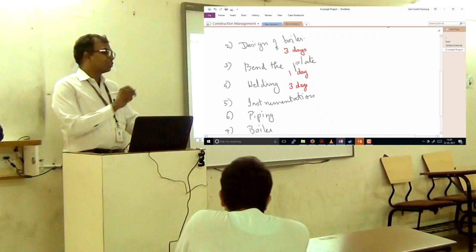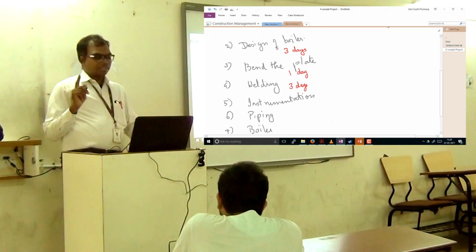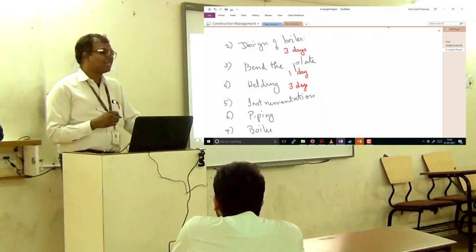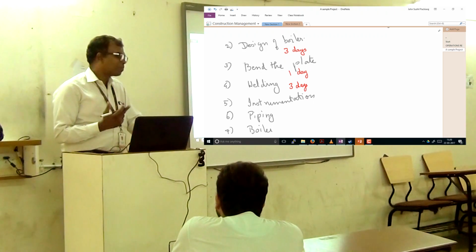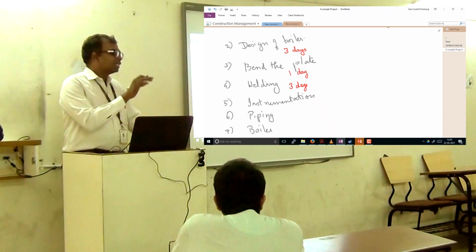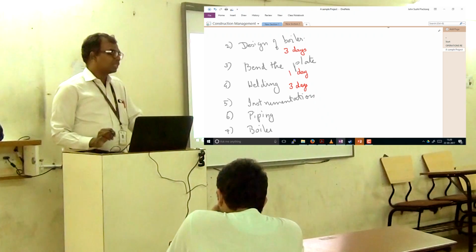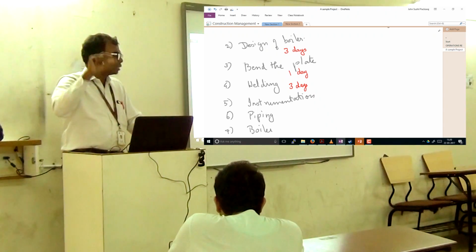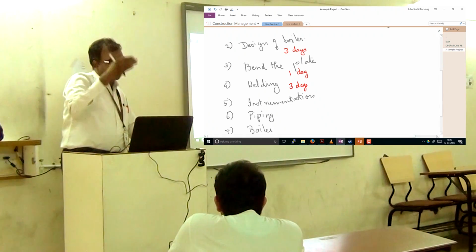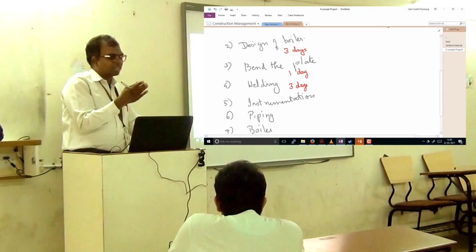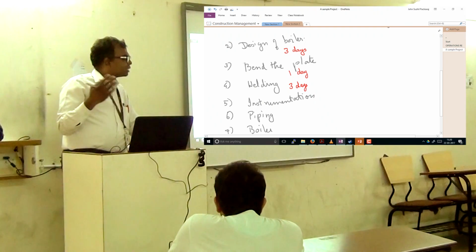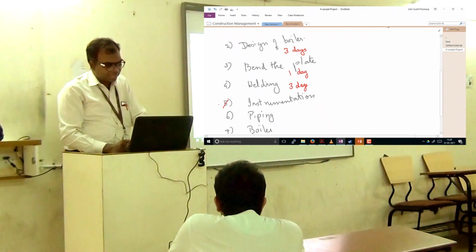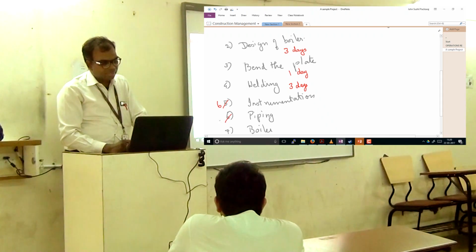Now we got a lot of instrumentation also required. Now here there is a slight question. Does piping come first or does instrumentation come first? Piping should come first. See, this is the value of doing this. Last class I think I showed you a Gantt chart where you just put a bar chart throughout. When you are making that bar chart itself, you are going to start to think, is this sequence right or wrong? Okay, so probably this I can make it as 6. I am making this as 5.